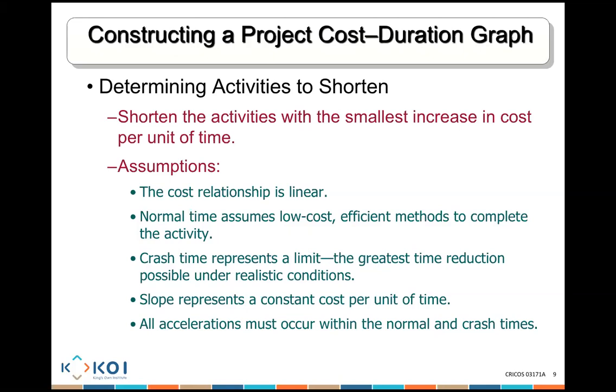How much for B, C, D, and E? Each of them is going to cost me something to reduce the duration by 1 period of time. So the slope is really the cost to reduce every activity per 1 period of time. Some activities might be able to be reduced 6 times, but every time there's a slope, how much it's going to cost you every time you reduce it.